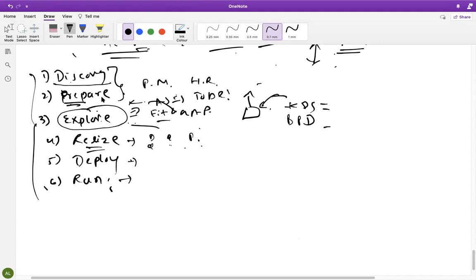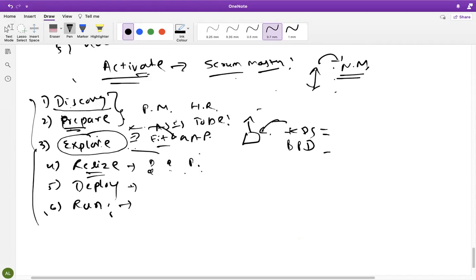So what are the advantages of the Activate methodology? The first one is that in the explore phase, they have servers to practice. Instead of theoretical business blueprint discussions, now users are able to see the SAP best practice screen. Best practice screen means, in whatever sandbox we give them, there is already a sample company with best practice implemented, company code 1000, for XYZ company. All the details will be there: plant, purchase organization, inventory activity. They will check all these things so that they understand what exactly we are going to do.